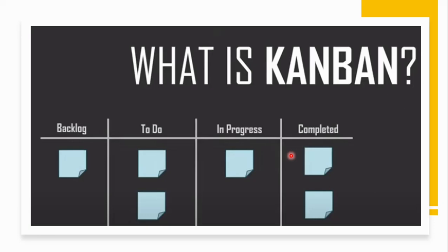So they have a Scrum board like this, pasted up on the wall. At the beginning of the iterative cycle, the sprint, you know these 10 activities or 20 activities to be done, and after each activity it goes to the progress and it goes to complete. So at the end of the sprint, if everything went right, there will be 10 here completed, and this column will be blank.